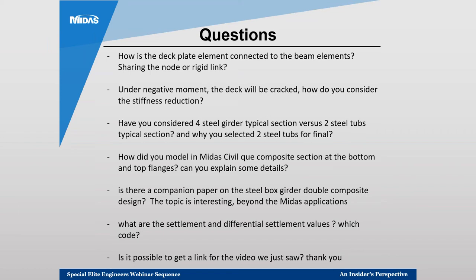The contractor's goal of minimizing steel is interesting. In the US, we're primarily used to saving on fabrication while spending a little more on steel. In Australia, it's the opposite — the goal is to save on steel and they don't really care much about fabrication costs. This same philosophy was observed on the Westgate Tunnel project in Melbourne, where steel optimization workshops were held to minimize steel weight at the expense of fabrication.